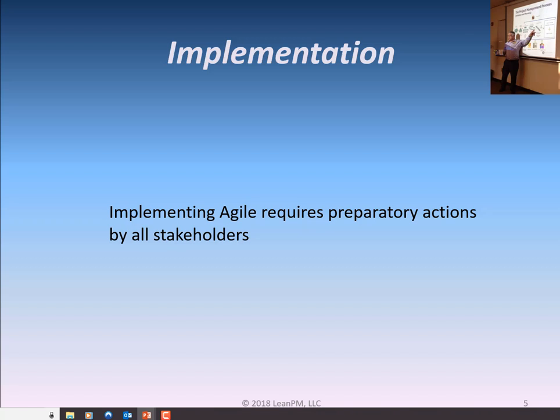2. If applying Agile for the first time in an organization, consider selecting a project that meets certain conditions to determine what went well and what needs to change. A project should not have too much visibility, otherwise the results might be atypical. 3. And finally, assign coaches to projects applying Agile, at least for the initial projects or until people have a good understanding of the topic. Naturally, these coaches should have a good knowledge of Agile, but also of change management.